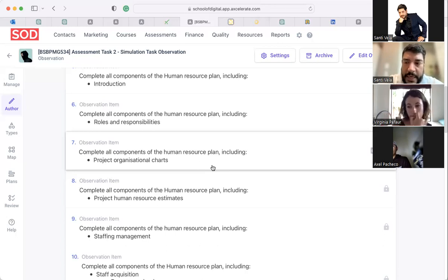Well done. We need to be very clear about these 3 elements. When we define the roles and responsibilities document, which is basically a paragraph that will describe the role of anyone in the project team, we need to disclose what the task is, when it has to be completed, and what budget is available for that activity to be completed. Perfect answer. Well done.